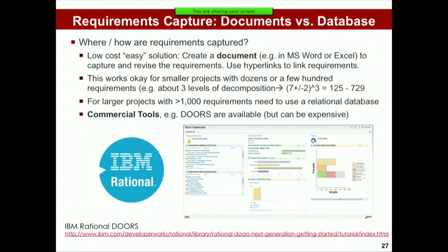And so this is not meant as an advertisement, but one of the most heavily used requirements tools out there is called DOORS. And this was relatively recently bought by IBM. This was a separate company. It was bought by IBM and included in a suite of software tools called IBM Rational for system development. And so DOORS is a relational database, it allows you to write requirements, share requirements, and the latest version of DOORS is actually web-based. So you can have people in India, in Europe, in the US, co-developing a system. You can all write requirements and manage them on this common database, right?